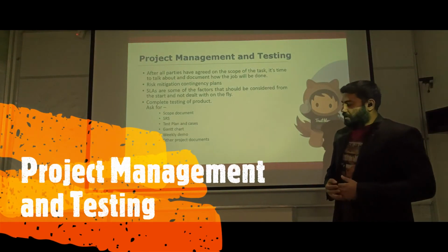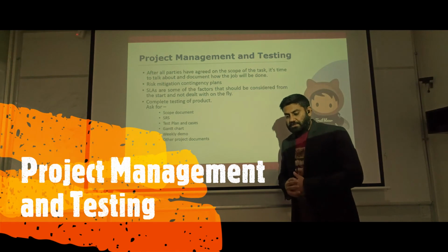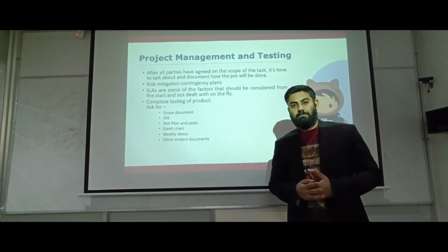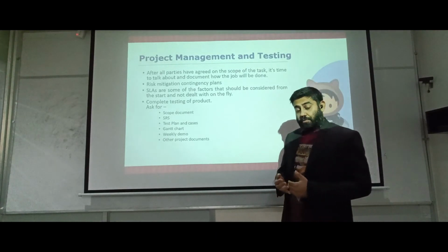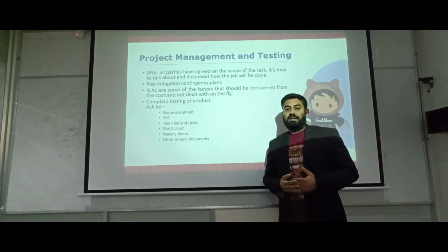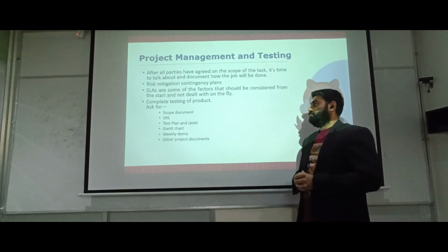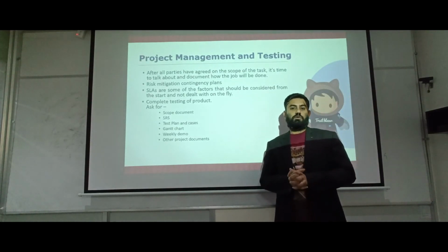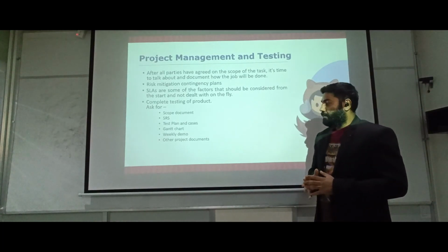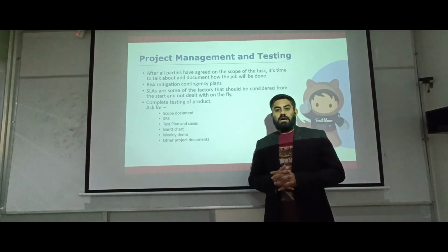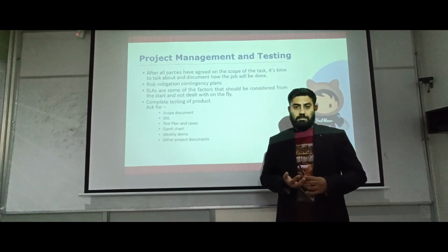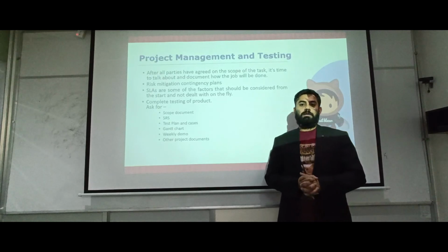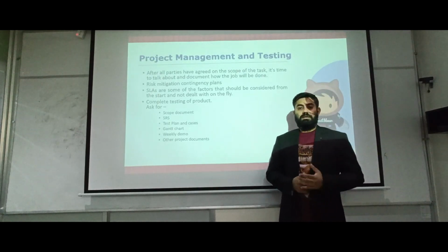Now when we look at a development project, it's not just a development project, it comes with a lot of other things. For example, we might want to look at whether they have project managers and testers available, because risk mitigation and contingency plans are all part of your package. If I am booking a project, I will ask whether they have a project manager who will engage with us, a tester who will check what they have developed, and what kind of documentation they will provide.